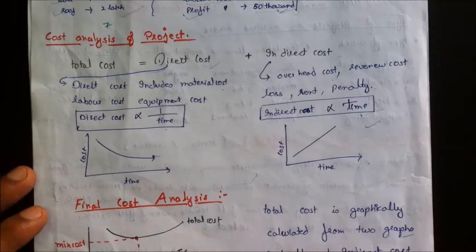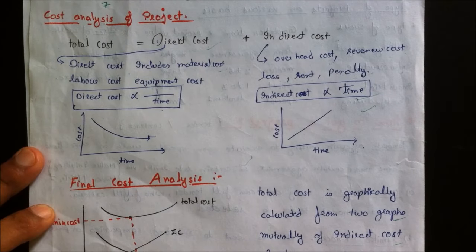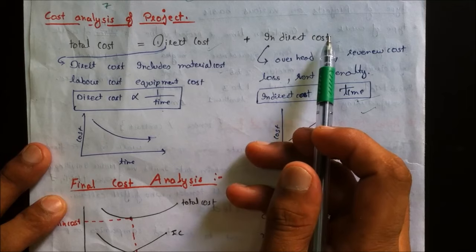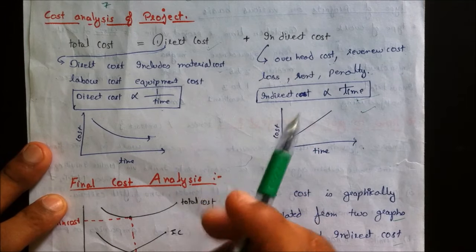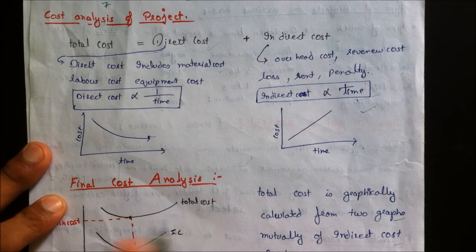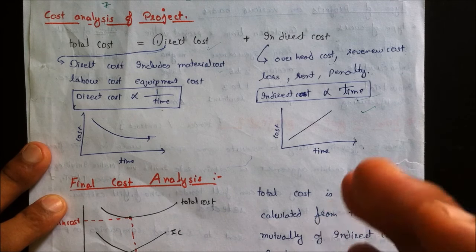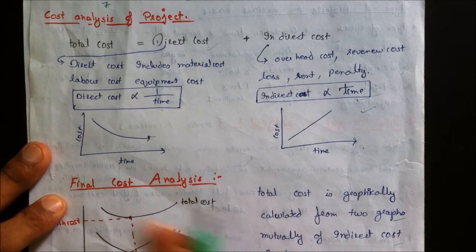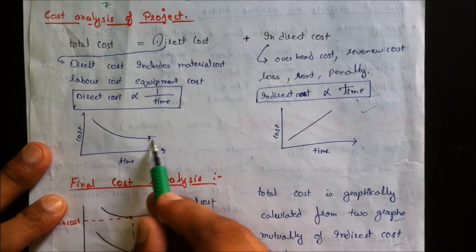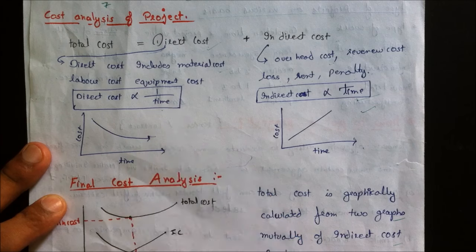In cost analysis we determine the total cost of the project. Total cost equals direct cost plus indirect cost. Direct cost includes material cost, labor cost, and equipment cost. Direct cost is inversely proportional to time — for a longer project, fewer pieces of equipment are needed, whereas a short-duration project requires more equipment running in parallel, increasing cost.